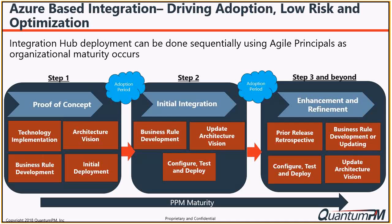I like to have a set of super users within an organization who really learn the solution and take that as an opportunity to build capability as we progress. You'd have a POC period — usually 30 to 60 days — and then you'd have adoption and build organizational maturity. Then figure out what the initial integration would look like, develop business rules for what it would look like, and then configure, test, and deploy. The question is what are the first primary integrations you'd want to achieve and what reports and dashboards would you need?